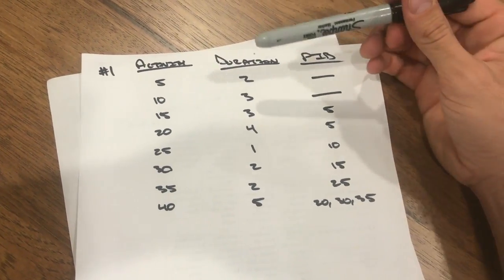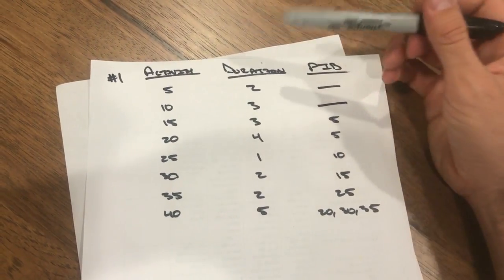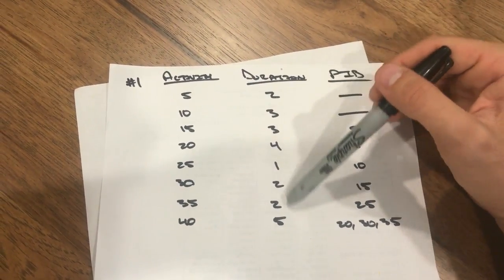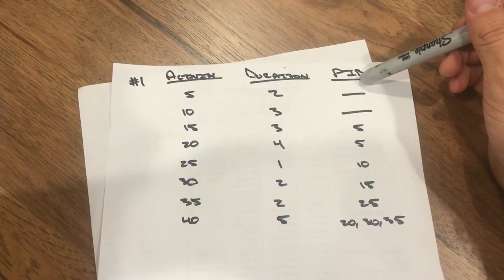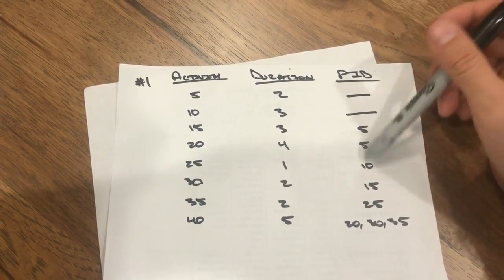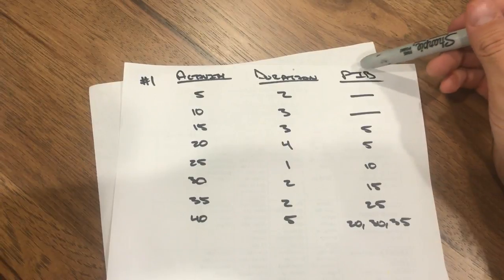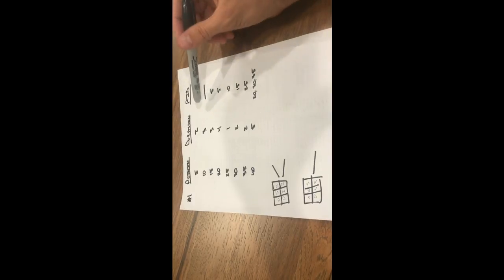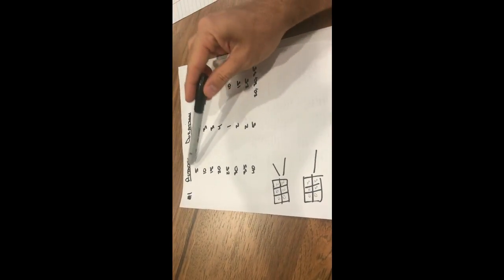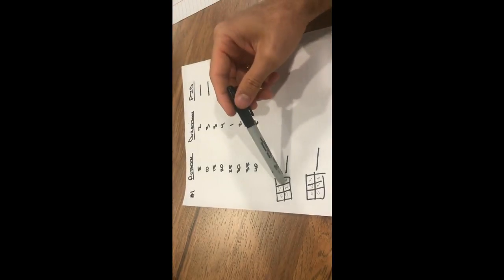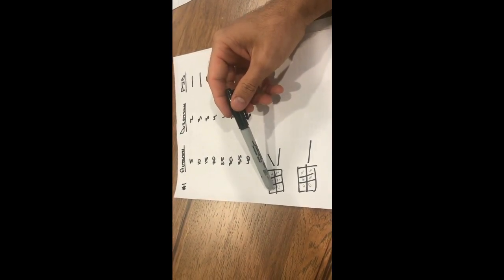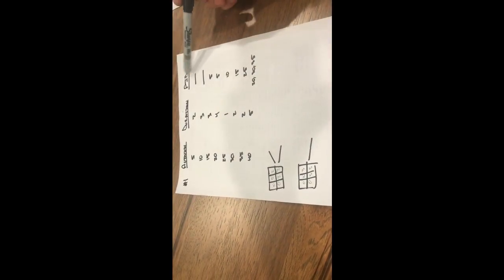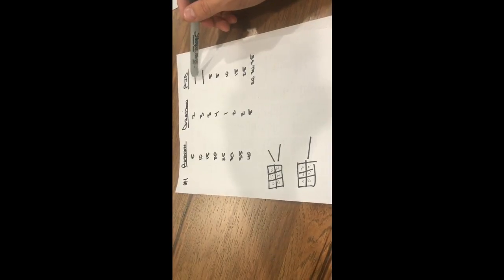The first step in creating your critical path method display is identifying all of the activities needed for the project, the duration of those activities, and determining the order that they need to be completed in, where PIB means preceded immediately by, needs to precede them. So here we have activity 5 and 10 that have nothing preceding. They begin here, and you can see that there's 0 days before those activities, since there's 0 activities that need to precede those.